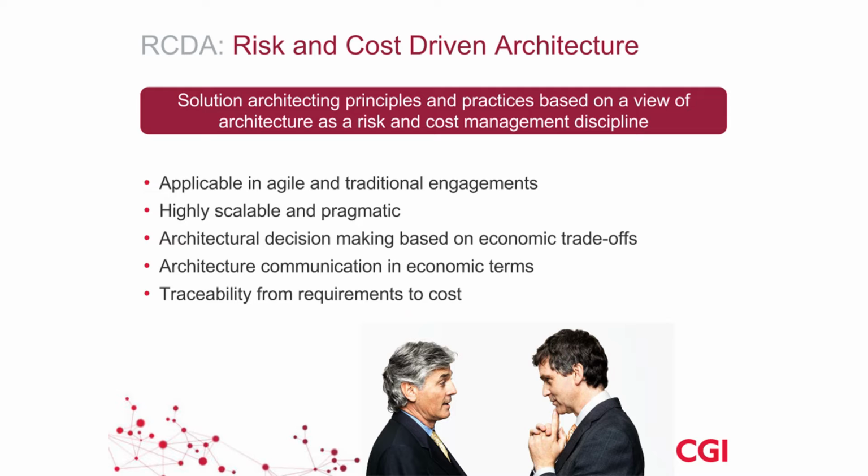Because in our experience, making the approximation of determining architectural significance by risk and cost already has the value in it. If a concern represents a lot of value, then it probably also has a high risk of not fulfilling that value, so you should avoid double counting. The second reason is that we have seen architects place too much focus on adding value, and these architects very quickly become unpopular because they are accused of doing gold plating.